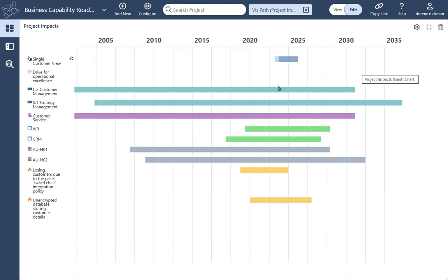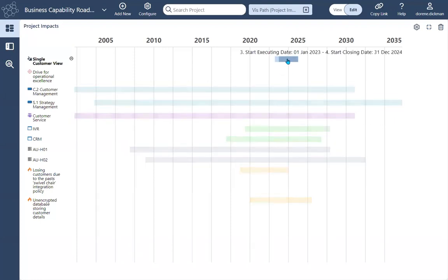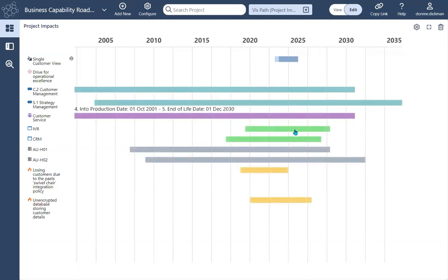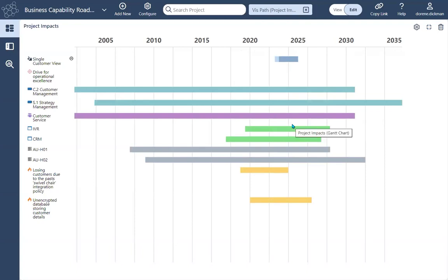Now, what I mean by that is, for example, if my IDR system end of life date fell within the project's time span, you could form an opinion that the IDR system could be excluded from this project and disruption avoided, because maybe, for example, the element might be decommissioned anyway from another effort.